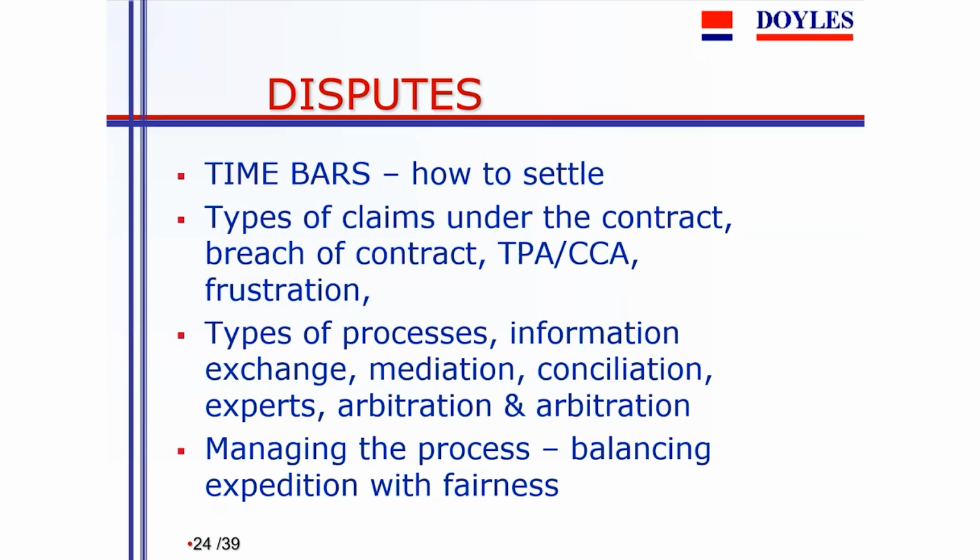The other aspect is that mediation is a very favourite topic in Australian construction. That is, you arrange mediation, which is the meeting of everybody with a mediator or a person that sits in the middle and tries to help people come to a settlement. Now, mediation has a disadvantage that it doesn't necessarily reach a resolution.